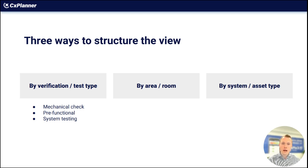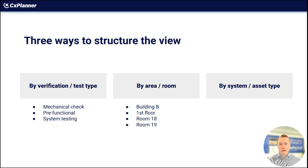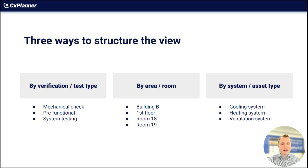The second way is by area or room — divided by building A, first floor, second floor, third floor, and so on, and you can also subdivide into specific rooms like a critical room. The third one is by asset or system type — the whole cooling system and then all the tests beneath that, heating system, and so on.